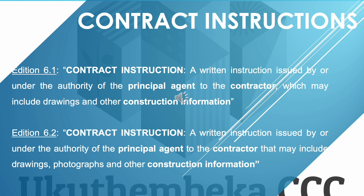For contract instructions: Edition 6.1 defined it as 'a written instruction issued by or under the authority of the principal agent to the contractor, which may include drawings and other construction information.' Edition 6.2 changed this to 'the written instruction issued by or under the authority of the principal agent to the contractor, that may include drawings, photographs, and other construction information.' Photographs have been expressly added.